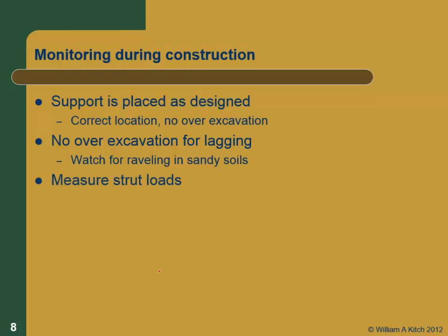You should be measuring the strut loads. It's not uncommon to get strut loads noticeably different than what you designed for. So it's really important that you measure them. At the Gold Line extension, they had strut loads way higher than they designed for, and they might have been 100% higher than they designed them for. So they were a little concerned for a while. But the worst thing to do is have strut loads 100% higher than designed for and not even know it. So if you know it, then you can do something about it. If you don't know it, you could have a big problem. So you should be measuring the strut loads.